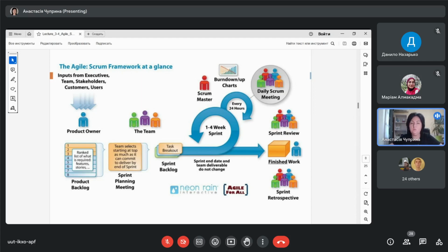At the end of the sprint review meeting, we also plan the next sprint. What does it mean, plan? I, as a product owner, give you priority for the next sprint's functions. So I tell you that for the next sprint, please show me functions number 5, 6, 7. Then the next day, you make a sprint planning meeting. Again, you sit together with your Scrum team. You take, again, new sprint backlog documents. You will have 4 sprints during the work, so you will have 4 sprint backlog documents. So you take the next sprint backlog document.